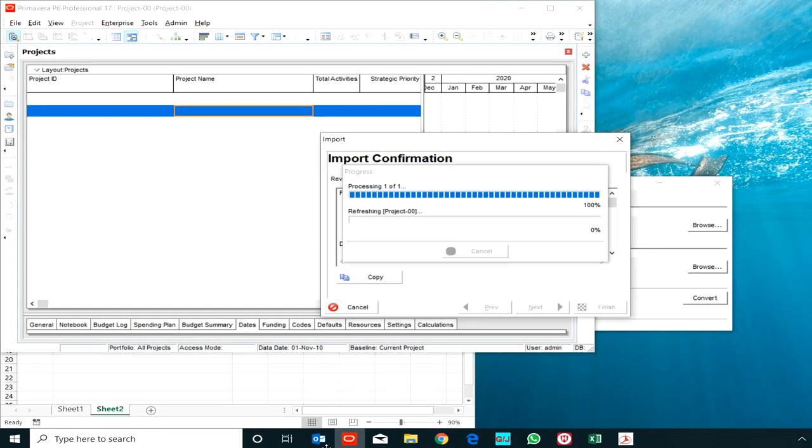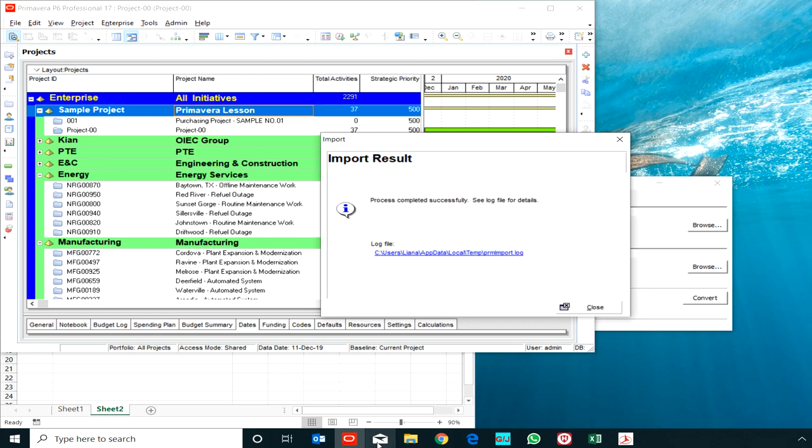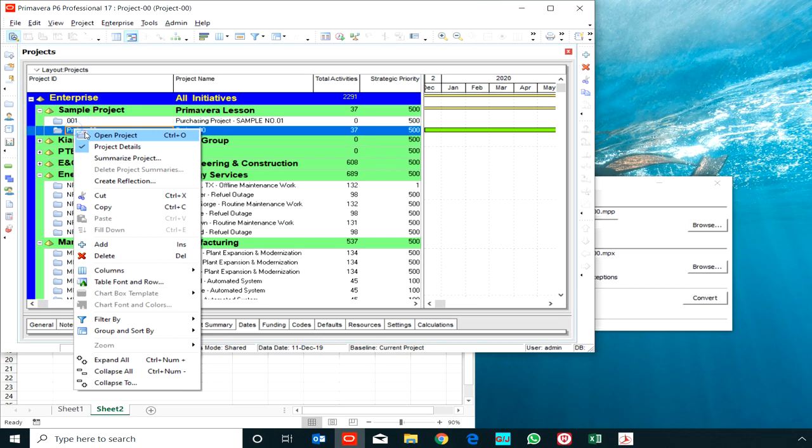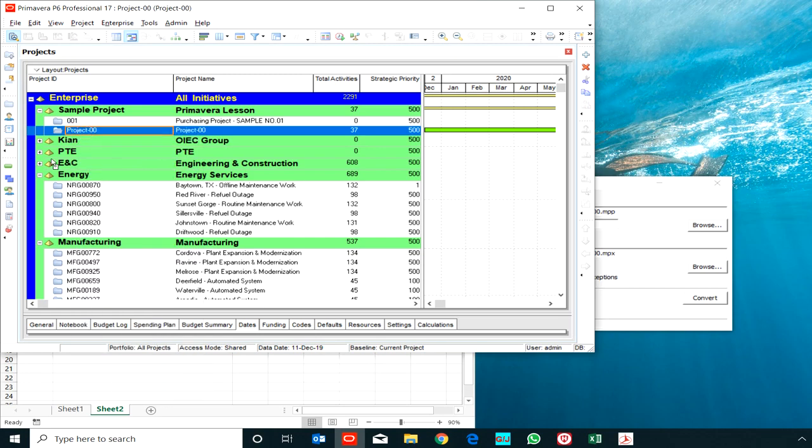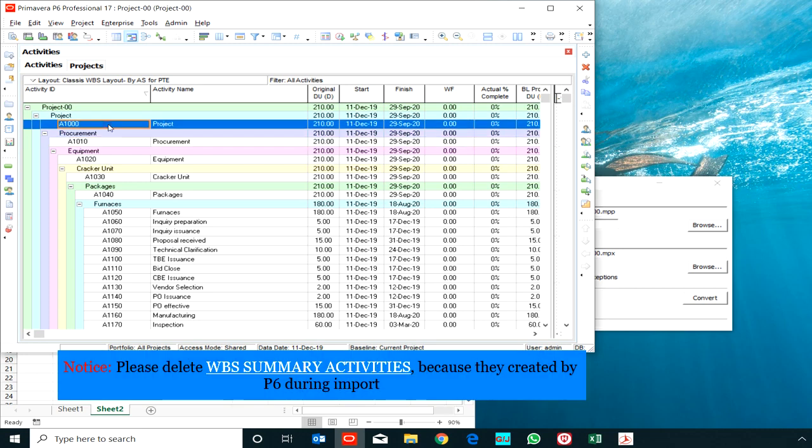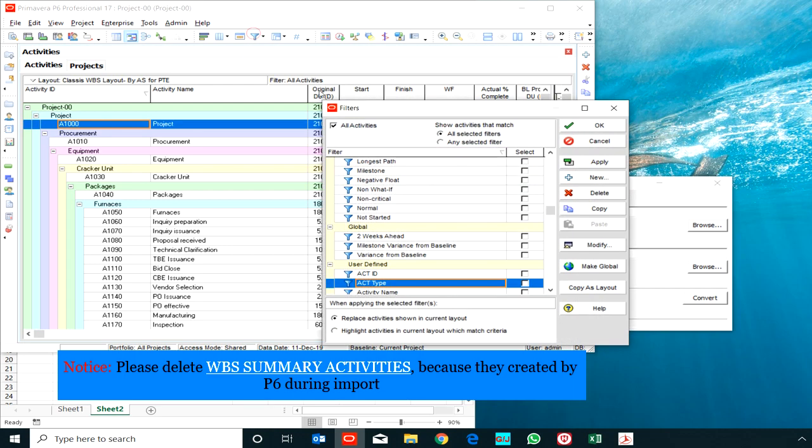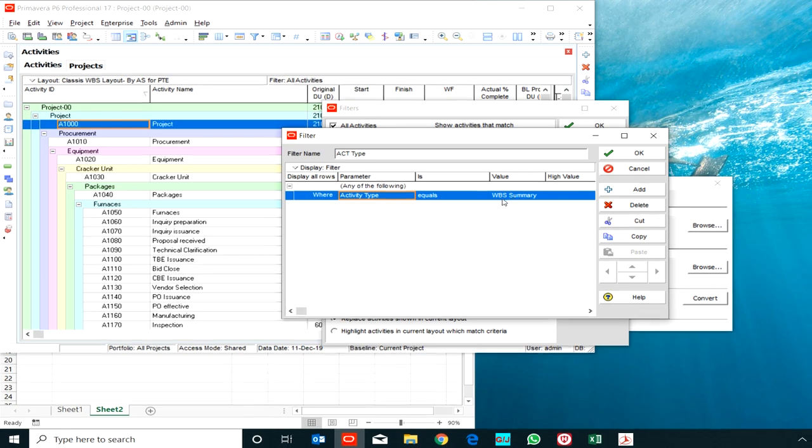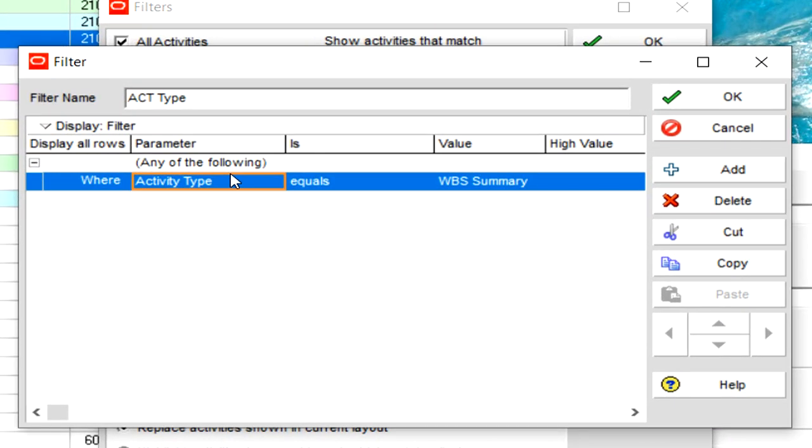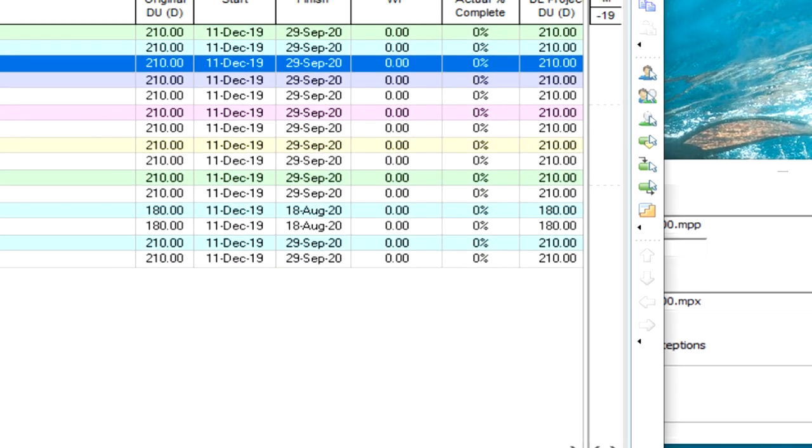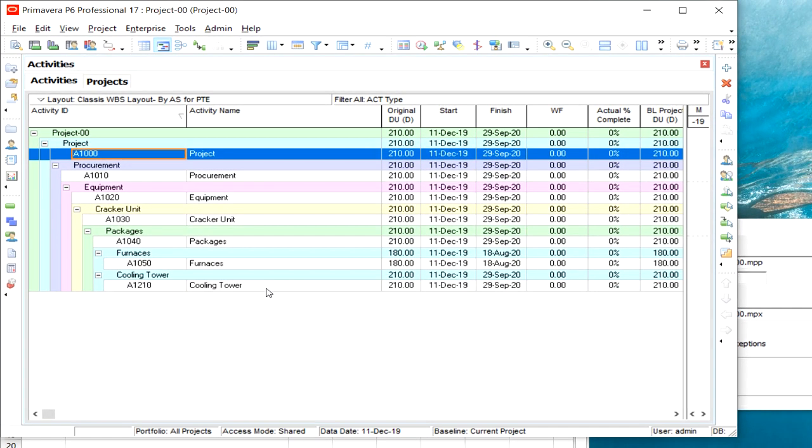It's a very easy way to prepare WBS. Please notice that in this export, Primavera MPP provides one activity with WBS summary type in each WBS, so you can filter it easily and delete them.